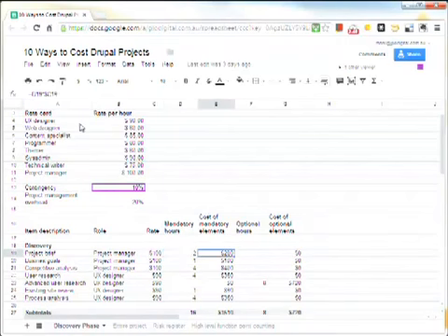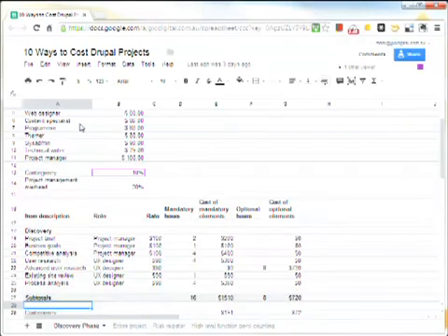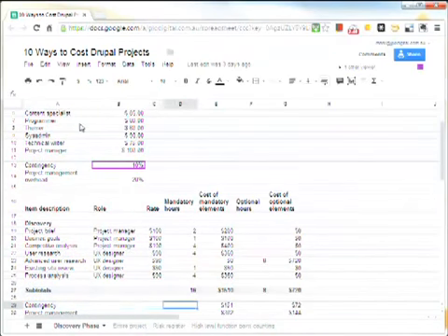With a cost of $200. So the same thing for the other roles, for these different steps. Fill in your own methodology. You need to add some sort of contingency obviously. So, I've chosen 10% there as a round number, but you could be 50% on a small thing like this, maybe.